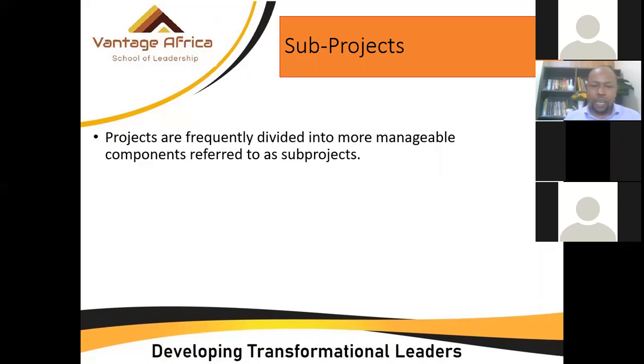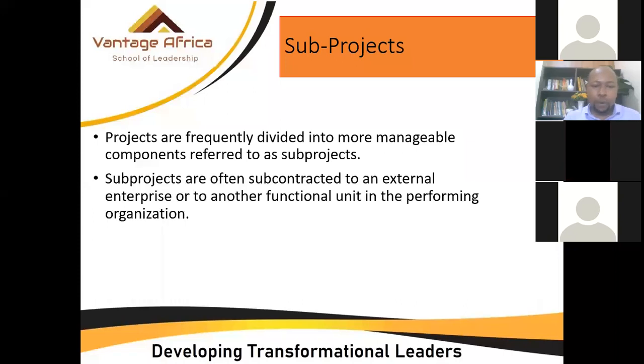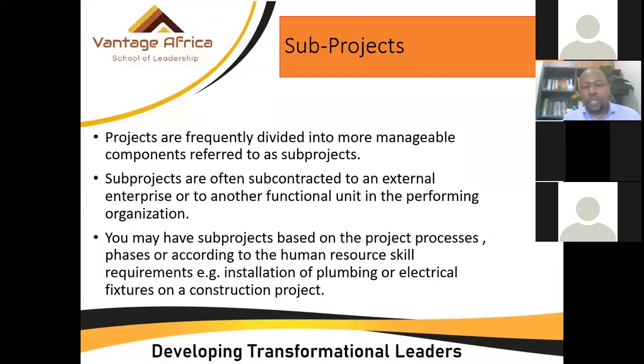Projects are frequently divided into more manageable components referred to as sub-projects. Sub-projects are often subcontracted to an external enterprise or another functional unit in the performing organization. You may have sub-projects based on the project processes, phases, or according to the human resource skill required, e.g. installation of plumbing or electrical fixtures on a construction project.